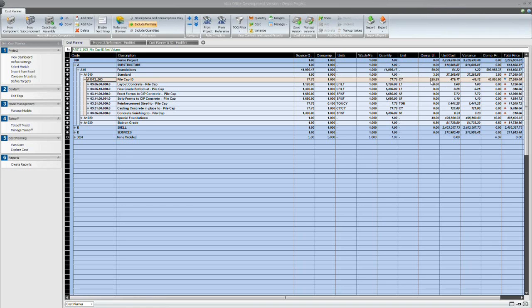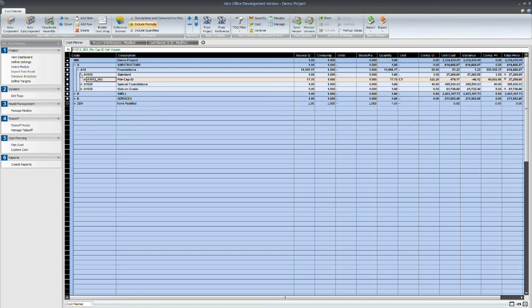This is where we were before, the 525, and our unit cost now from the more granular level is 479. So we're getting immediate feedback here. We're getting a little blue down arrow saying that the price has gone down. These other areas where you can see in red, then they've gone up. So we're getting instant feedback there, albeit at a fairly simple level of where the price is moving with new designs.